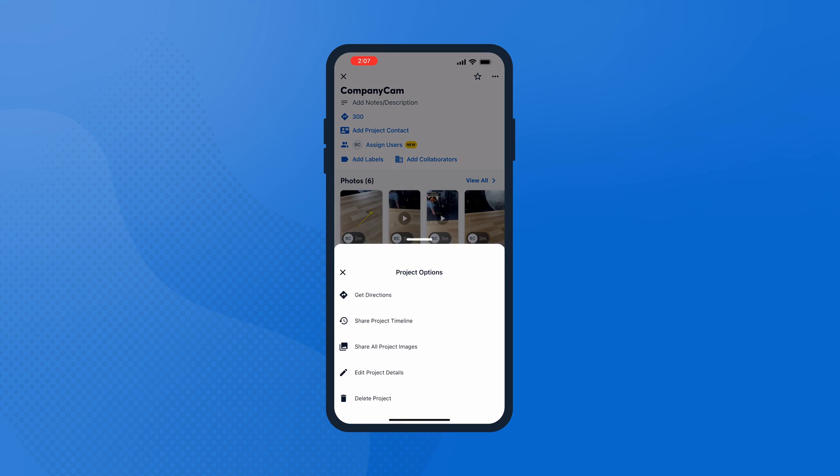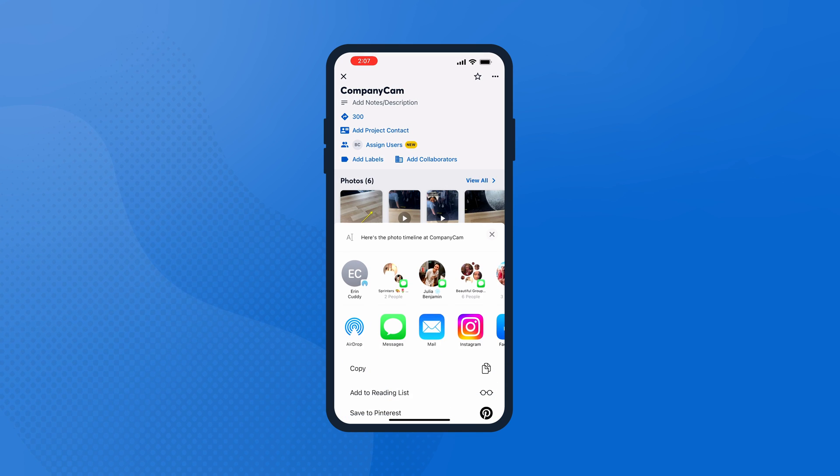The users added to your CompanyCam account can always see your photos and projects, but we know there are times you want to share that content with people outside of your company too—whether that's with a client, a subcontractor, or insurance adjuster. So we've created timelines, galleries, and project collaboration. Project timelines give you the ability to keep homeowners updated on the progress happening at their home without any extra phone calls or tedious work on your end. Once you have the project created, copy the timeline link and paste it into an email or text message to let the customer see every photo happening at the project in real time. Once the link is shared, your work is done. They'll be able to reference that same link over and over to see photos roll in as they're being taken.